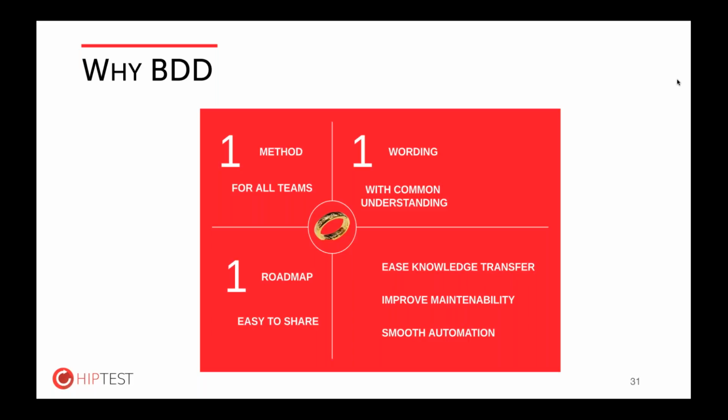Yes, with big pressure. It was very important for us at the end of the build phase to transfer not only the code and the application, but also the business knowledge to the maintenance team. So the best way to do that is to transfer documentation, which is a living documentation, and the BDD scenarios that were used at the beginning of the project to define the behavior of the feature now act as a living documentation for the maintenance team.